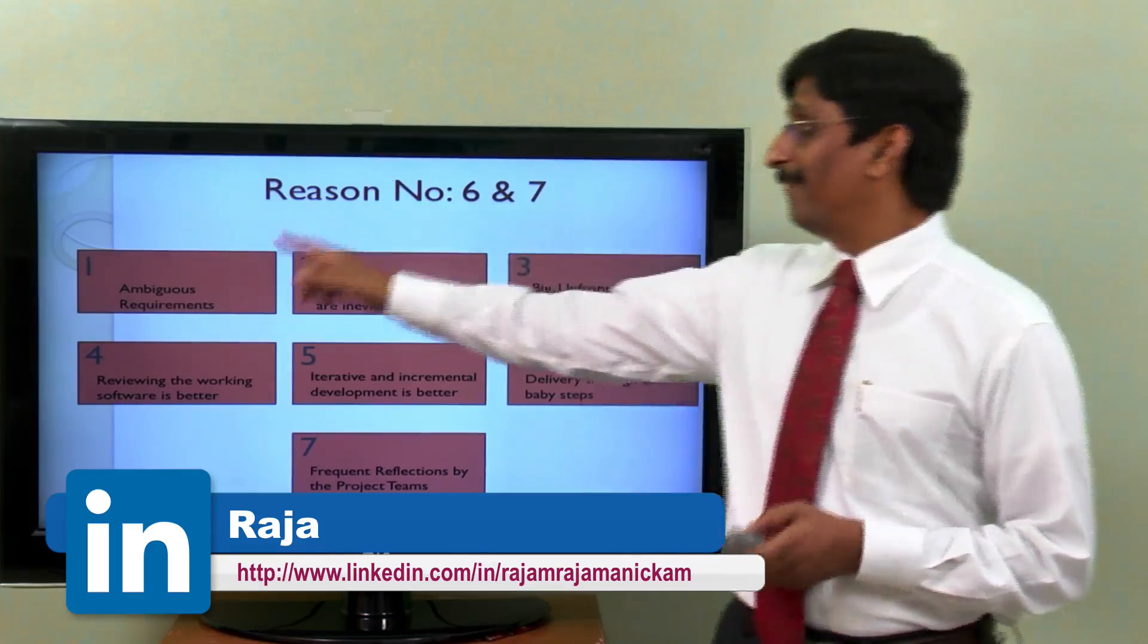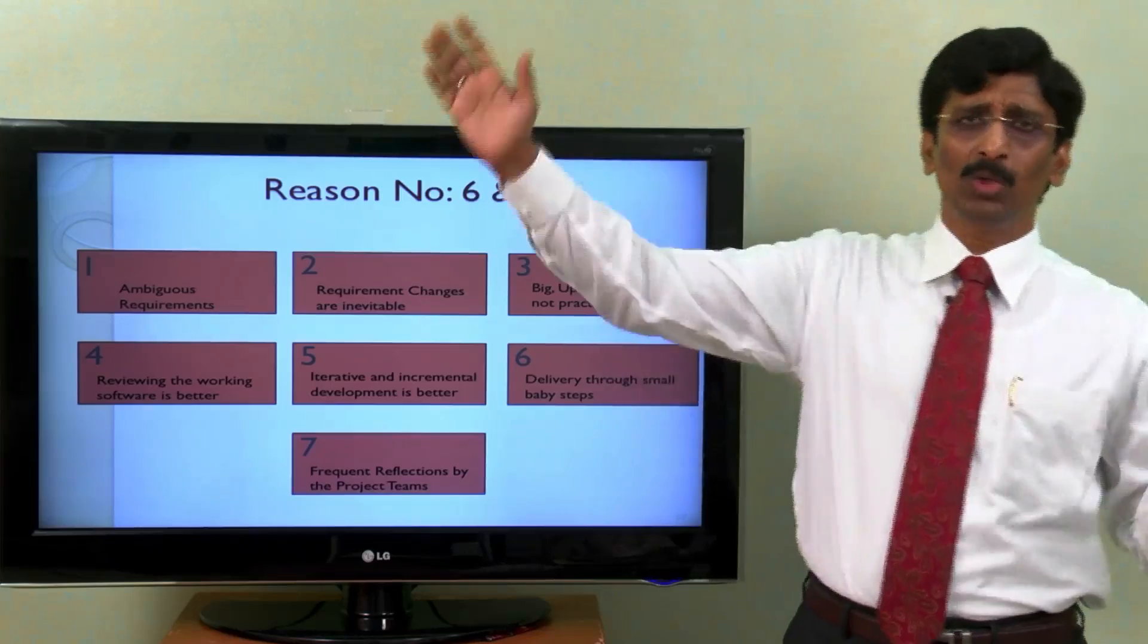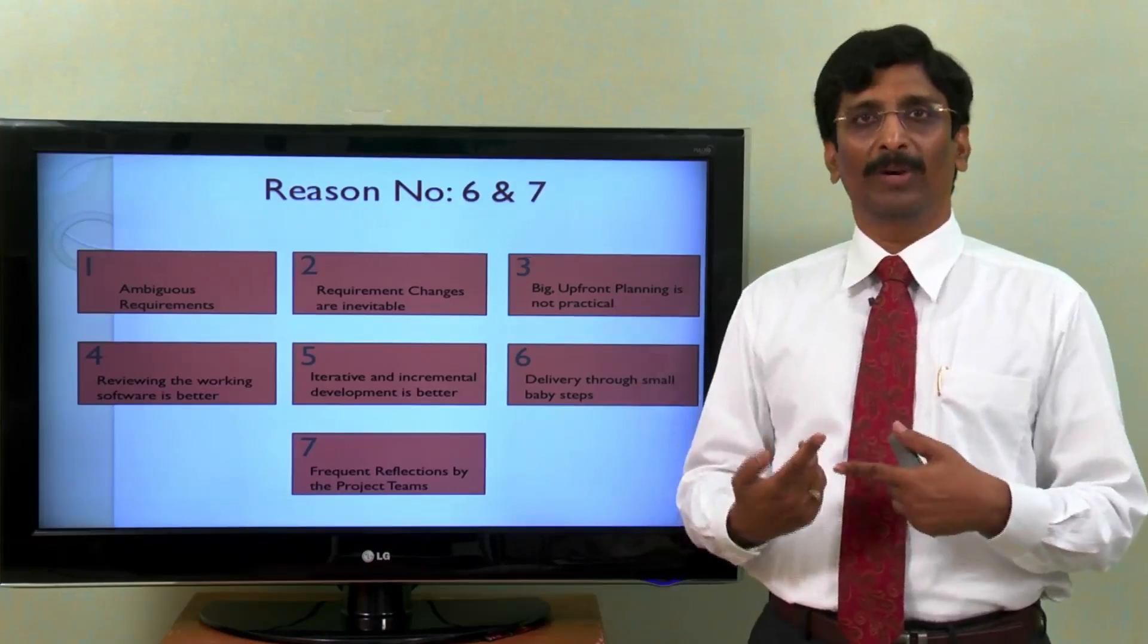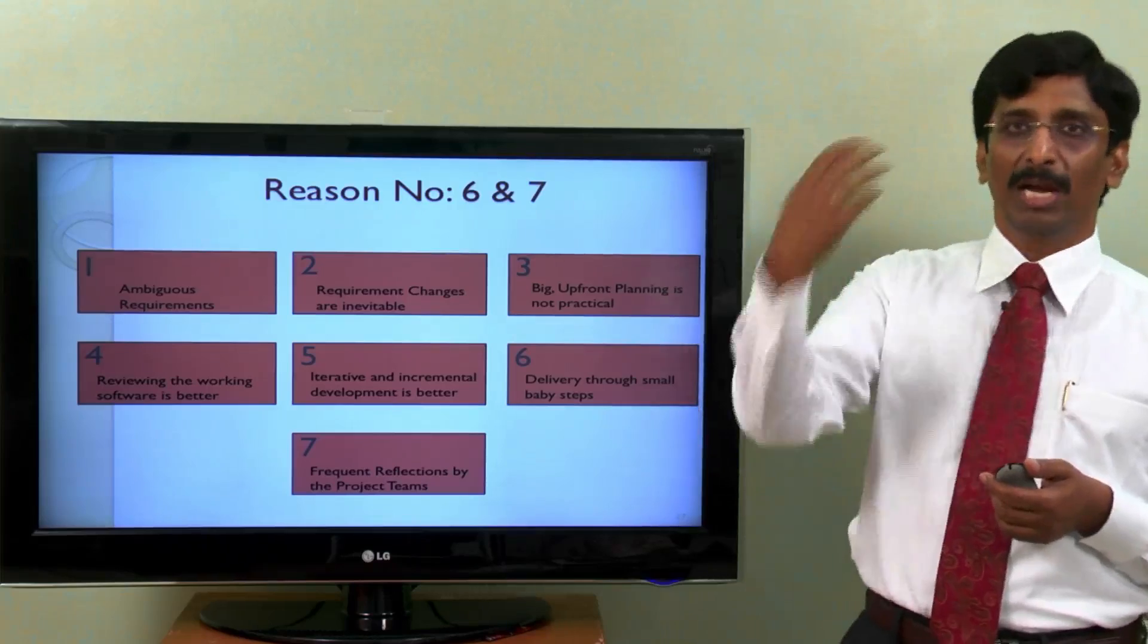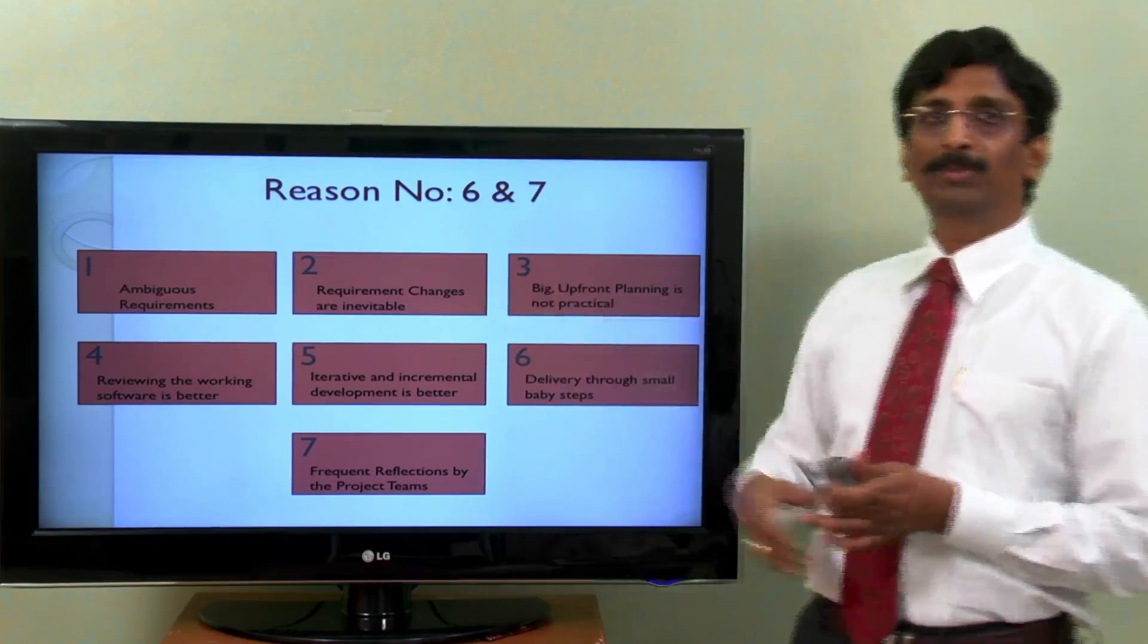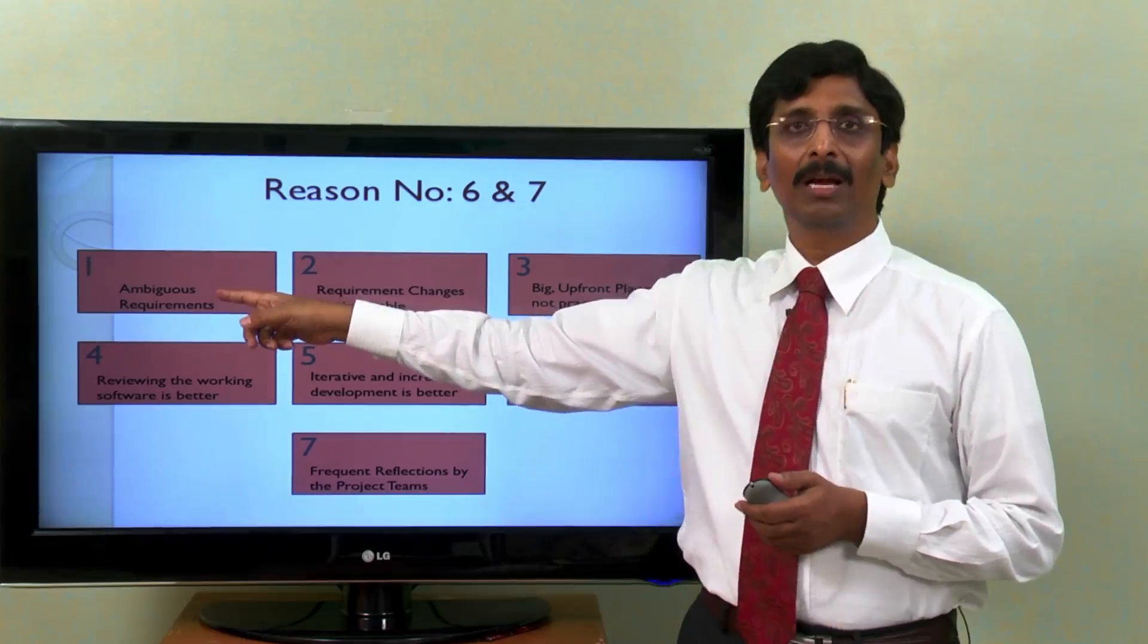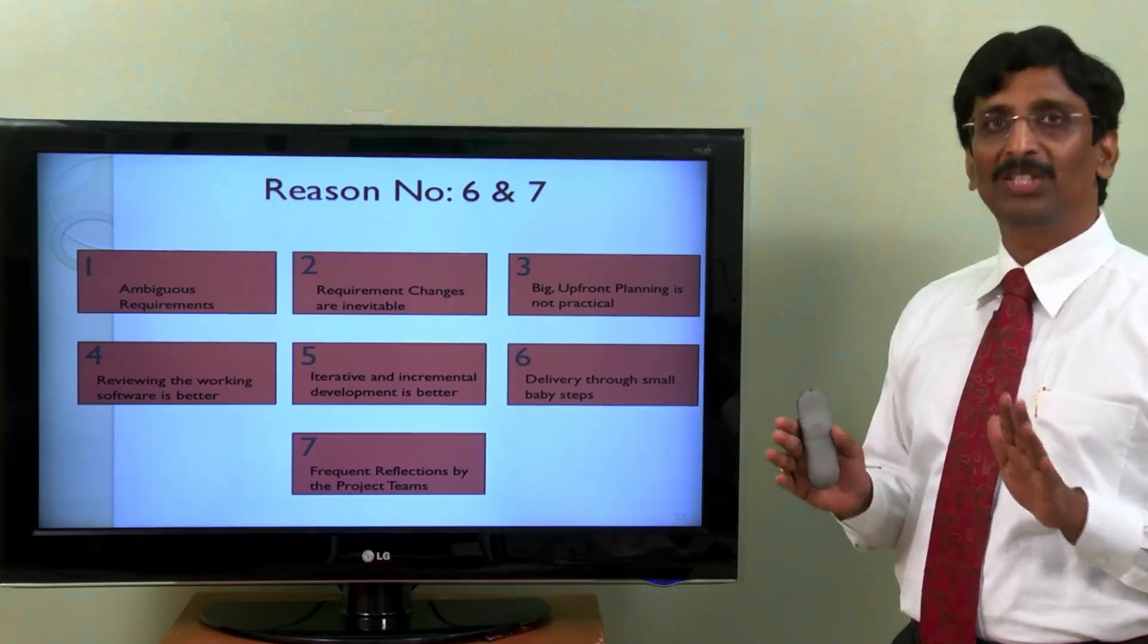So every Agile project start with what you currently know and tell me the top most five or six features or requirements that you want in this product. We will quickly show you your working software. After seeing the working software, then you are free to add new changes. Yeah, new requirements. So requirements changes are welcome in Agile. We don't stop the customer to change their mind. We encourage the customer to change their mind based on what is already shown to them.